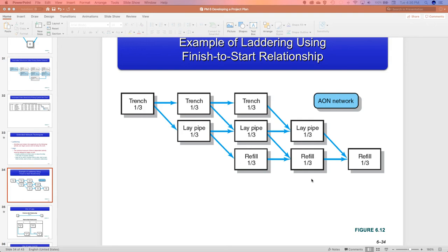So this particular thing is also how you build a house. Let's say you're in a development and you've got the crew building the slab. So they'll come in and they'll do the earthwork and the dirt work. And then when they're done, they'll move to the next one, and the people who build the slab will build, but the dirt crew is on the second slab, on the second house. Once the slab crew is done, the dirt crew's done, and they move to the third one, the slab crew moves to house number 2, the framing crew comes into house number 1, and so on and so forth. And that's how they can build multiple houses in one day, right? Okay.